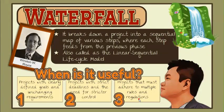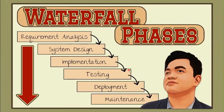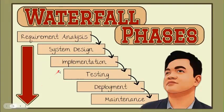The whole process is divided into sequential stages. Each stage has concrete deliverables and is strictly documented. That's why it is imperative to complete each phase successfully in order to move on to the next one. This means the next stage cannot start before the previous one is fully completed. Let's take a look at the six phases of the waterfall model.